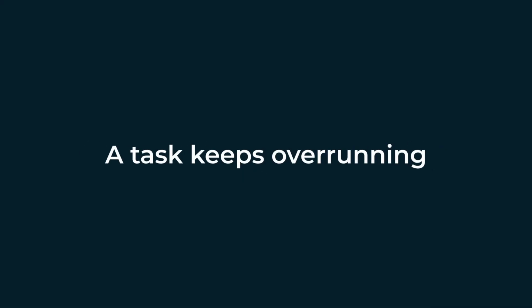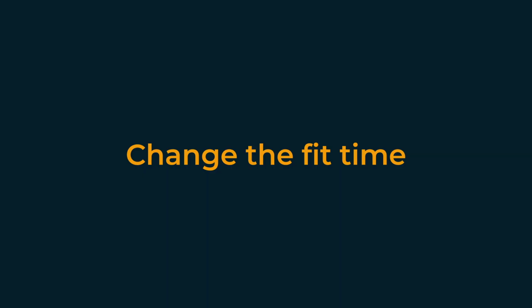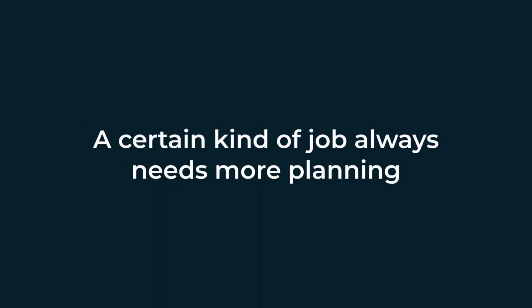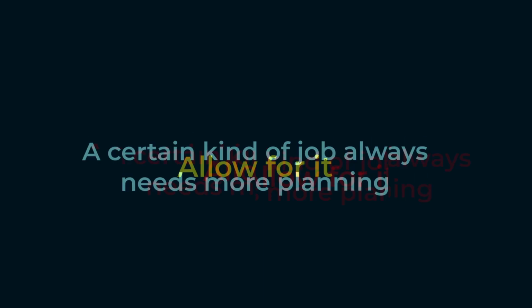If a task keeps overrunning, change the fit time. If the site time keeps eating margin, change the uplift. If certain kinds of job always need more planning, allow for it. That is how labour pricing improves, not by guessing harder, but by seeing where the quote failed.